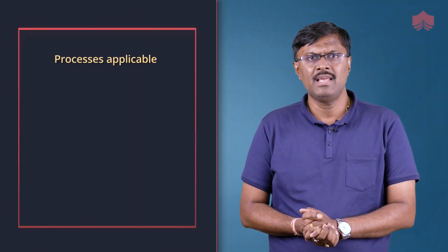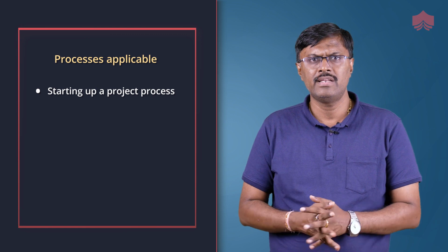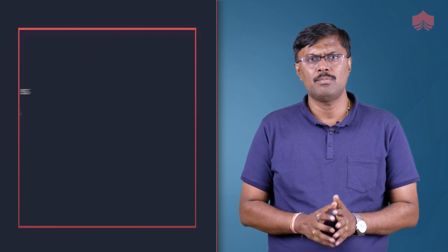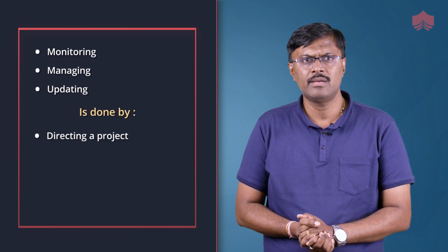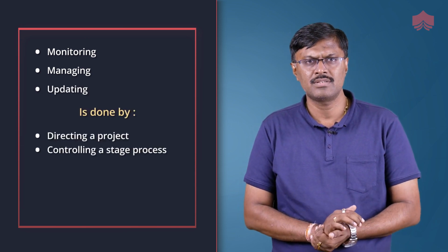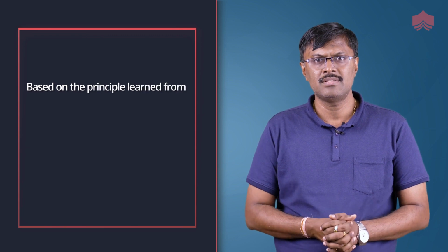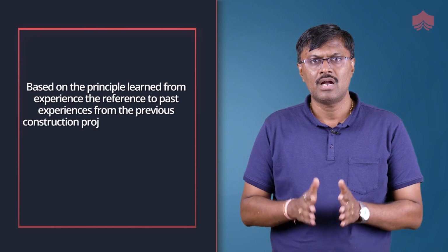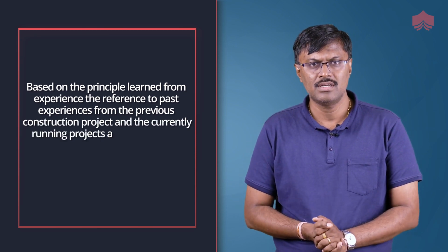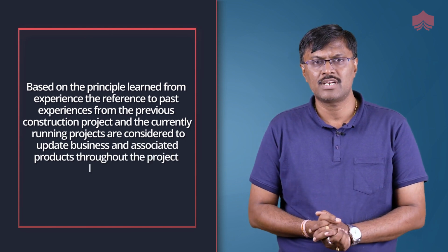The processes mainly applicable for creating business case are starting up a project process and initiating a project process, whereas monitoring, managing and updating the business case is done by directing a project, controlling its stage process, managing stage boundary process and closing the project. Based on the principle learned from experience, the reference to past experiences from the previous construction project and the currently running projects are considered to update business and associated products throughout the project life cycle.